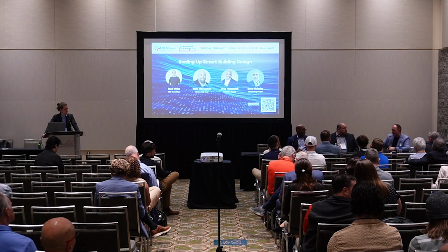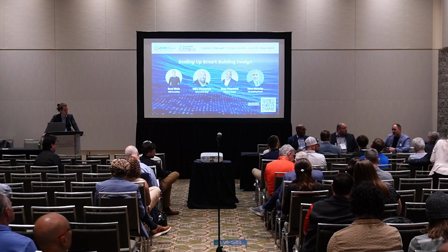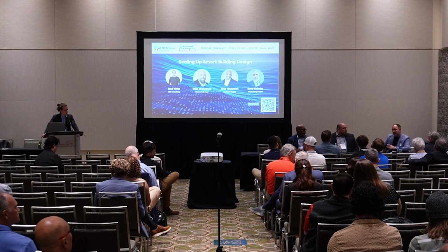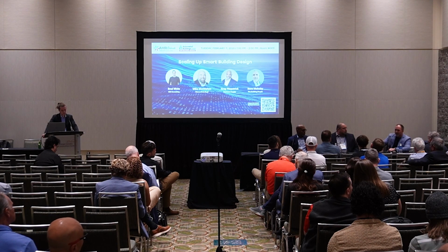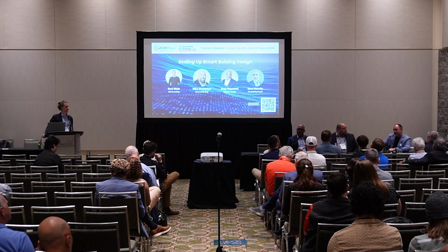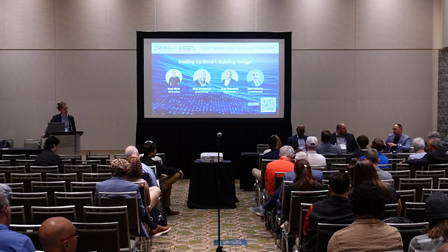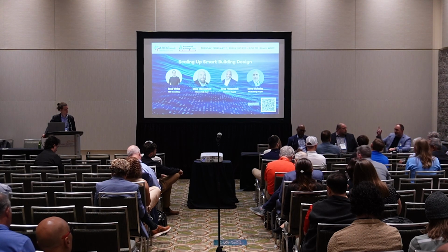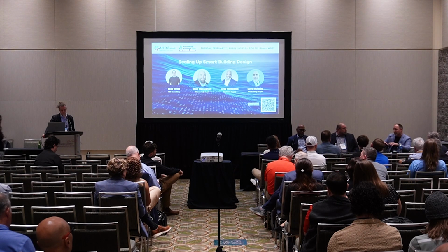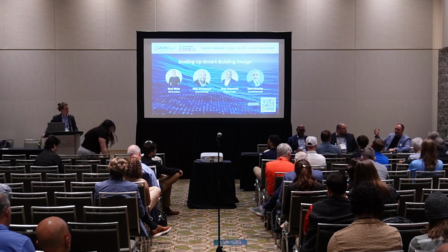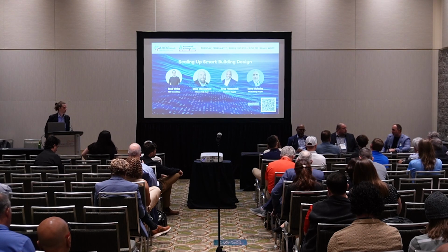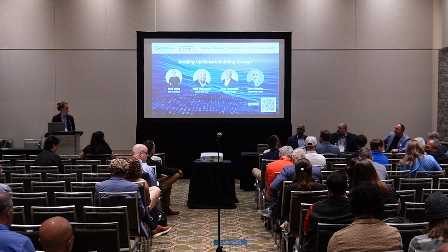And that's, again, what you're doing up front when you're selecting that type of equipment. You don't want to select something that might be proprietary, or maybe it has an API, so it appears to be open, but do your homework. Make sure that this isn't something with an annual fee on that API, and you're dying by a thousand cuts, right, of all these extra fees for this equipment. So, having something that can be natively integrated inside the building instead of having to go out to all these different private clouds, try to do that first. If you can't, that's okay. Then there are those other options out there, right, where this technology can work for you. Yeah, and ask questions.